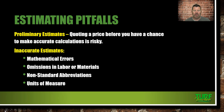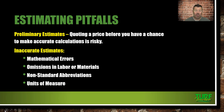Preliminary estimates: quoting a price before you have a chance to make accurate calculations is risky — don't do it. Inaccurate estimates come from mathematical errors, omissions in labor or materials, non-standard abbreviations on plans, and units of measure. You need to be able to read a scale and read dimension lines to accurately figure out plans and estimate projects.